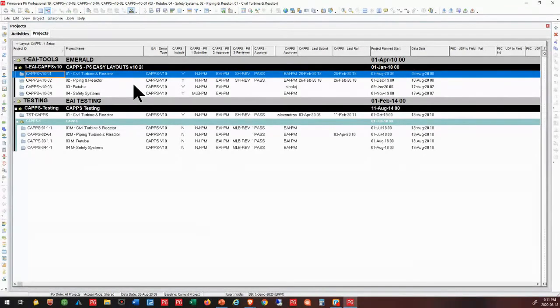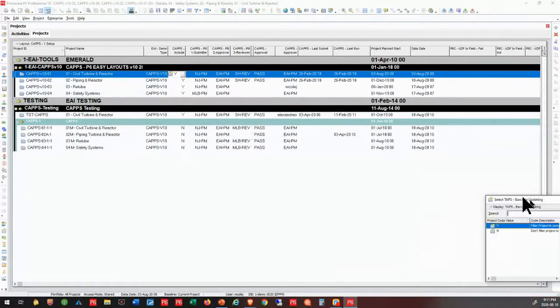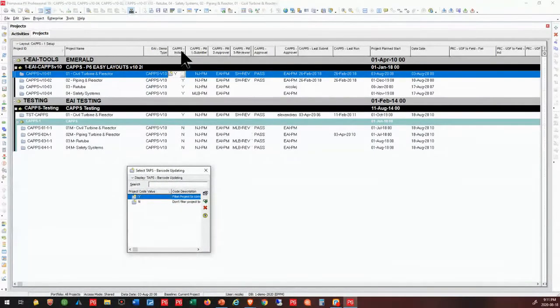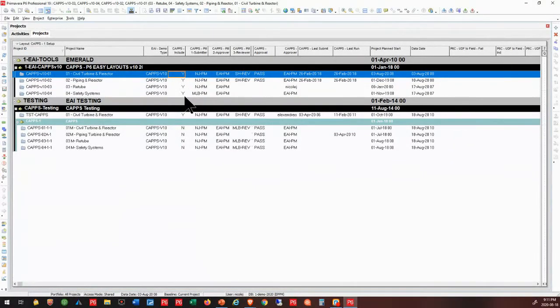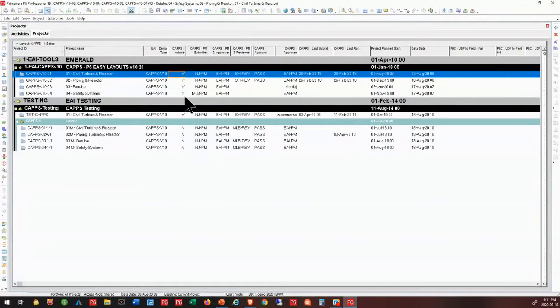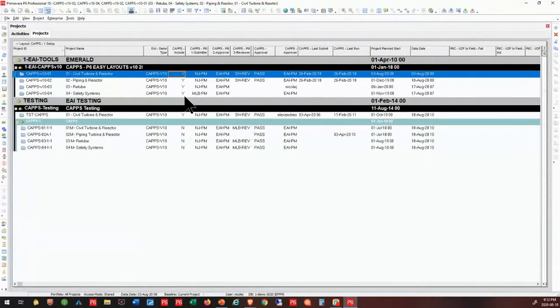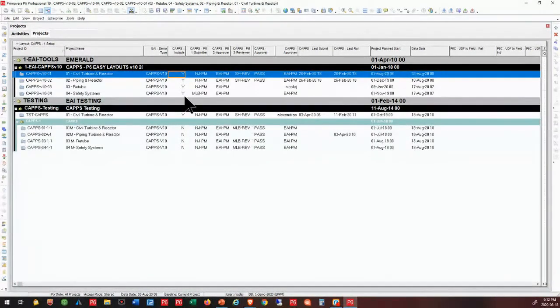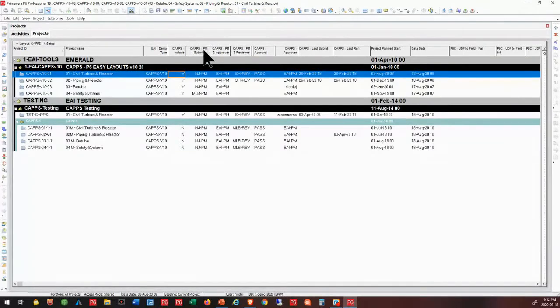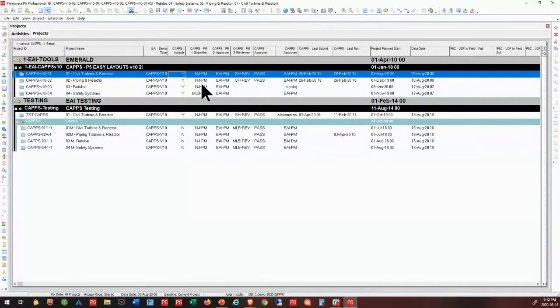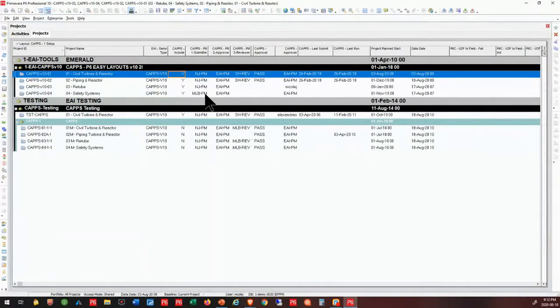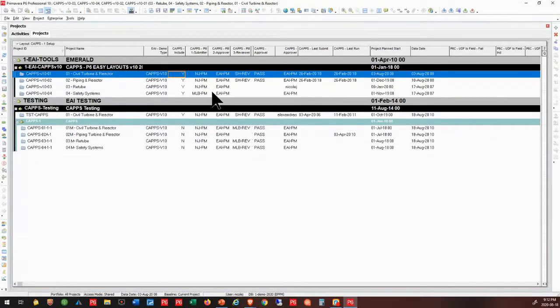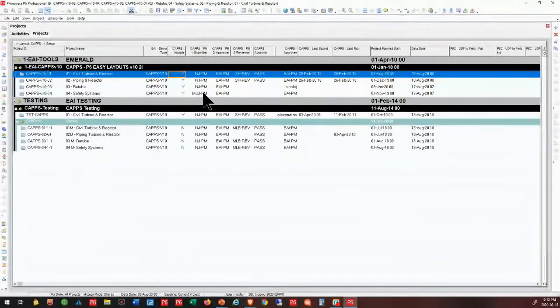You can control that. So we have a field that says yes, I want to use CAPS or no, I don't. So you can control which ones out of the gate you even want CAPS to look at and work with. Now, in terms of how you want to get somebody to look at the activities and do updates, we have two different mechanisms. So you can either use project level coding, saying in this case that Nicole is going to do the updates and Mary Lynn is going to do the updates on this project. So if your project is managed in such a way that one person will do all the updates, then you can easily use this project level coding.